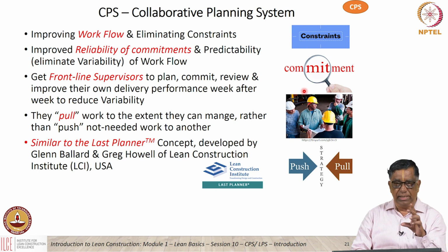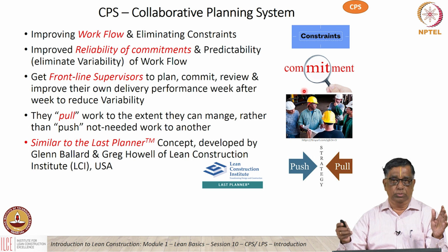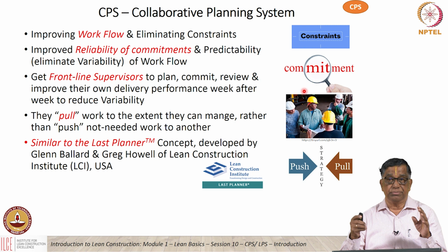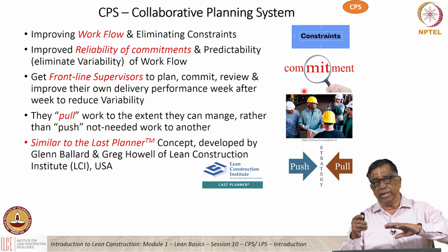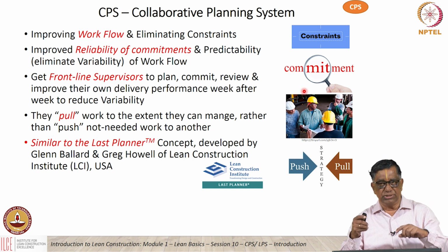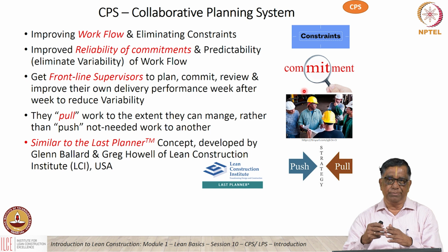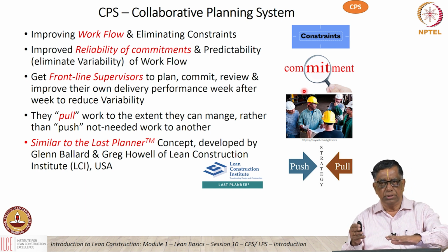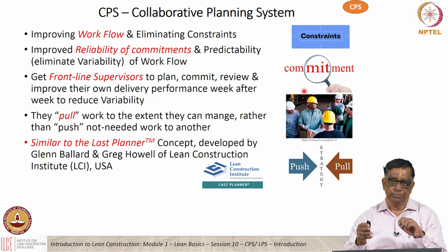In the weekly planning, what we do, we have what's called a big room. The big room concept is again another very interesting concept in Lean. We say that when people are talking to each other across the phone or through drawings or through third parties and all that, a lot of communication gap is there. So you put all the interested parties, the related parties, in a single big room, let them talk to each other among themselves and come to their settlements.